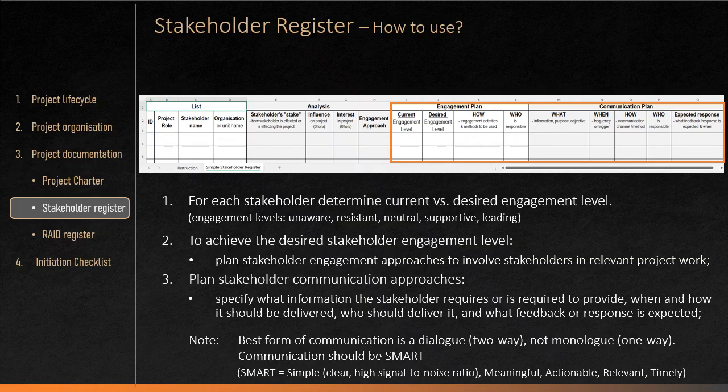And once the stakeholder register is created, it should be validated. A quick and practical approach of validation is to review the stakeholder register with the project owner. But the most effective approach is to validate stakeholder register records directly with relevant stakeholders.